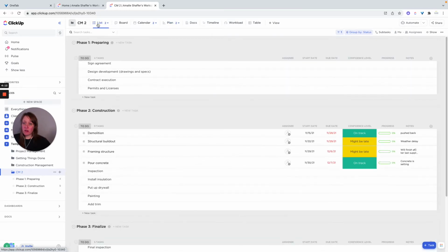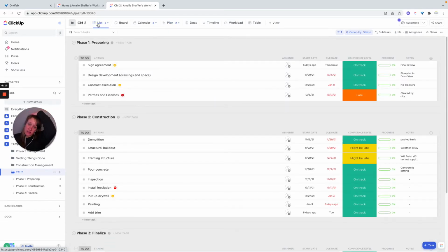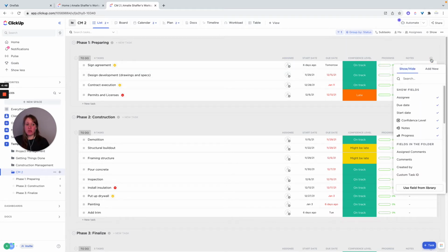Oops, sorry, I meant to click back on list here. Okay, so what I would do first is go in and go through each of these tasks that are already in here and figure out, is that part of your phase 1 preparing, phase 2 construction, phase 3 finalize? And then I would decide, what's the range of start date to due date? Does this confidence level work for you? Do you want the notes? And then are there other custom fields that you would want to add here to help you stay organized?